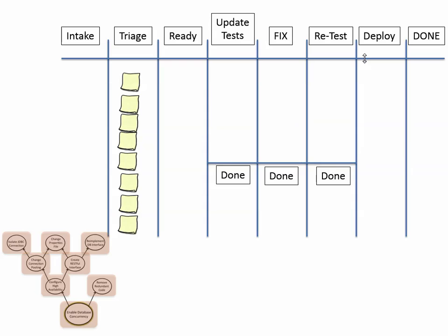Now I've got a backlog. I can start pulling over the items that are at the leaf, right? Start pulling those over, and I can prioritize my leaf stuff. So for example, if I'm interested in dealing with the stuff on this side first, for whatever reason, that seems to be the most important thing to be handling. Again, especially if this happened to be an architectural change where I'm trying to figure out features, I should be driving what's going to get me to the feature fastest and has the right amount of risk management to it, right, to prioritize these things.